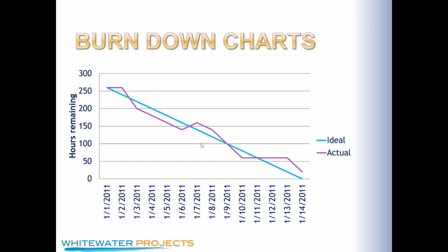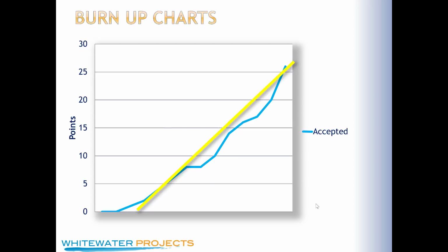And they worked on it for 4 hours. And they got to the end of that and went, wow, this is really complicated. It was a 7-hour card, but I think we probably still have 12 hours remaining on it. It's way more complicated than we thought. Even though we worked on it for 4 hours, I think there's 12 more hours to go. So it went up. You see? That's why the estimate went up there. All right, so then we burn down. So that's burn down charts. They help you see how you're trending on this current sprint.